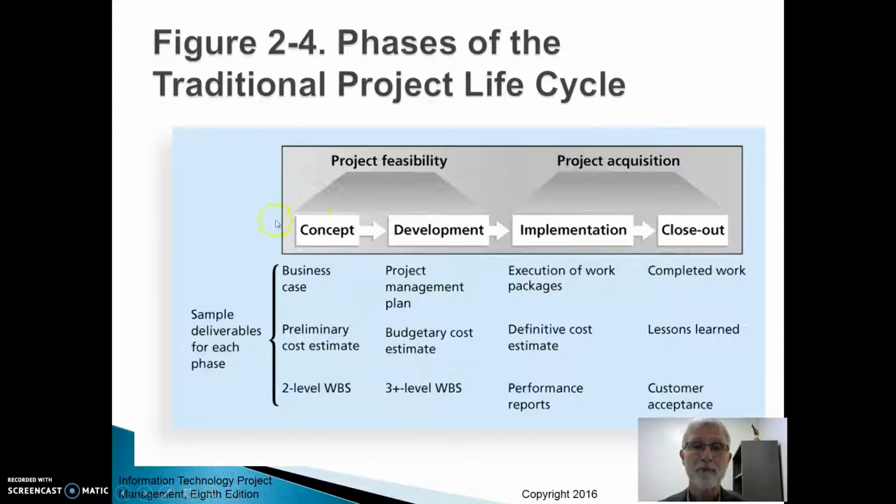Project feasibility is I'm taking a project from concept to start laying out the plan to actually implementing it, and then what happens when the project's done, and then some of the deliverables that may be associated along each way. So keep an eye on what's delivered at each different step, because as a project manager, you're going to make sure as I go to the next phase, I've got to have sign off on the business case, the cost estimate, the work breakdown structure, the WBS, before I can move on to the development phase. So as a project manager, you're going to verify that that stuff's done, along with making sure it's complete for the next phase.